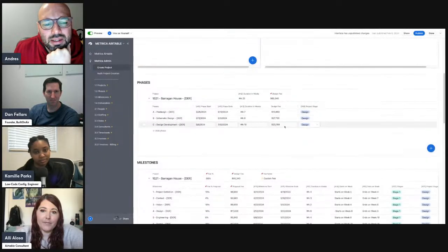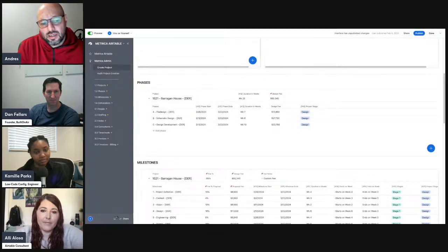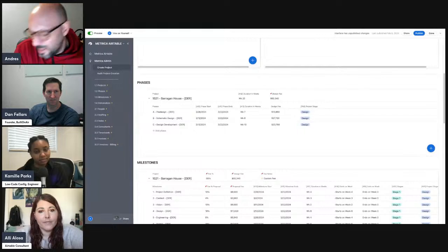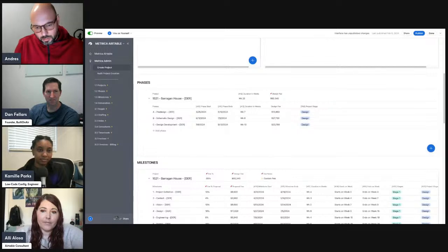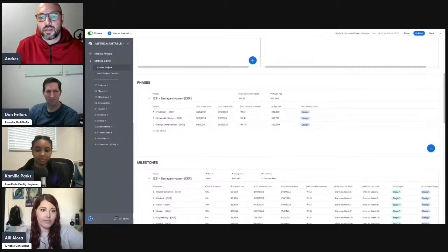The one thing about this, and I guess that can translate to all industries, well, maybe not, I don't know. But one thing is architects and architecture has a standard process that is very well documented for public projects and for commercial projects, and for people that are very sophisticated about how they talk about the project. And you have phases like schematic design, design development, construction documents, and there's milestones within those phases like 50% design development.